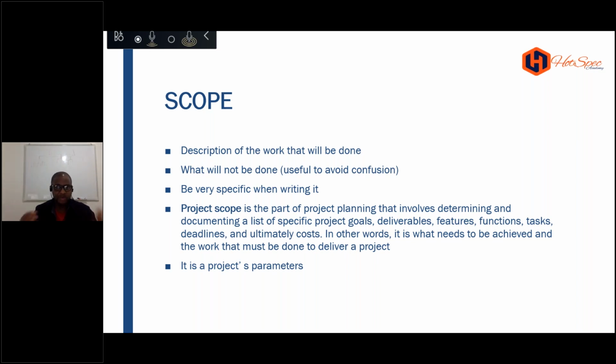So a scope is a scope. Try to clarify it. Furnish my house. I ask, what do you mean by furnishing? I mean furnish, like buy furniture. Okay. Do you mean your entire house? No, just my living room. See why I would have gone wrong. And I'm going to furnish everywhere. No, I mean just the living room. No, don't worry about upstairs. Don't worry about the bedroom. Just the living room. Now, the guy thought you understood that it was furniture in the living room alone, but you didn't.